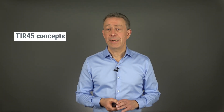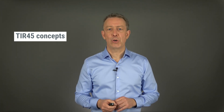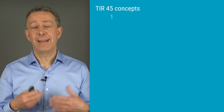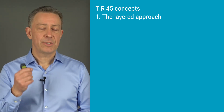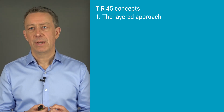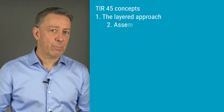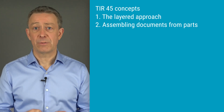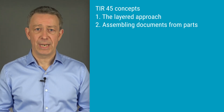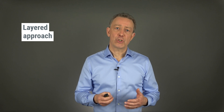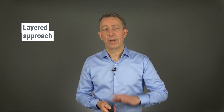TIR45 has many interesting concepts and ideas, but I've chosen two I find particularly useful. The first concept can be called the layered approach — a systematic approach to high-level planning that describes what you intend to do at different points in time. The second approach is about assembling documents from pre-approved parts. Let's start with layers. The idea is to describe how functionality will evolve into a complete product, and how and when various standards and regulatory requirements are met.